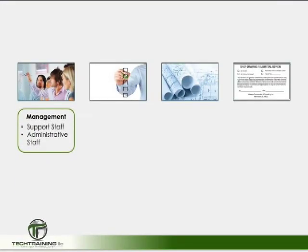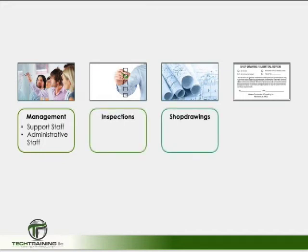Next is management. Support staff and administrative staff directly impact the project schedule. These tasks have to be considered when creating a network schedule — tasks such as preparing inspections, processing shop drawings, processing approvals, tracking funds, and submittals all take time. When developing the model, a variety of issues must be considered, so think about the objective of the schedule.